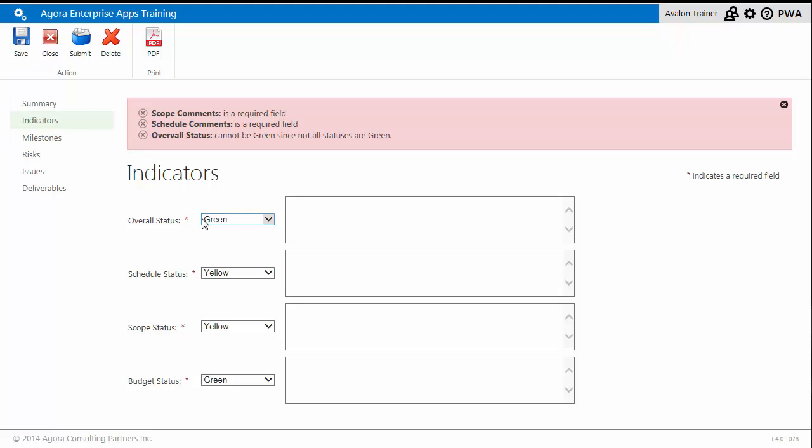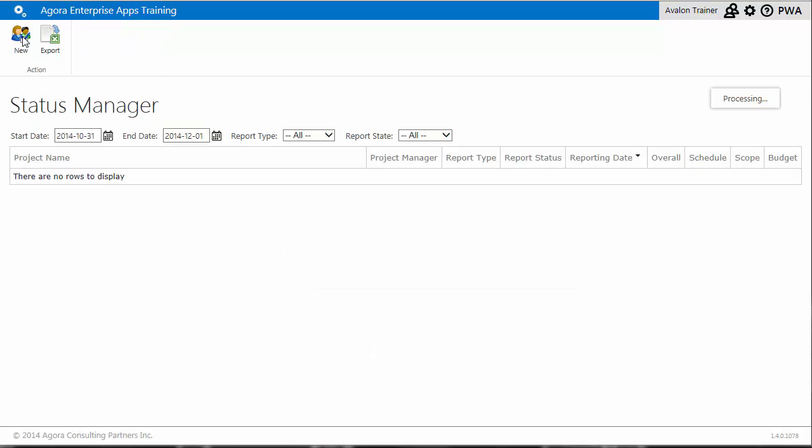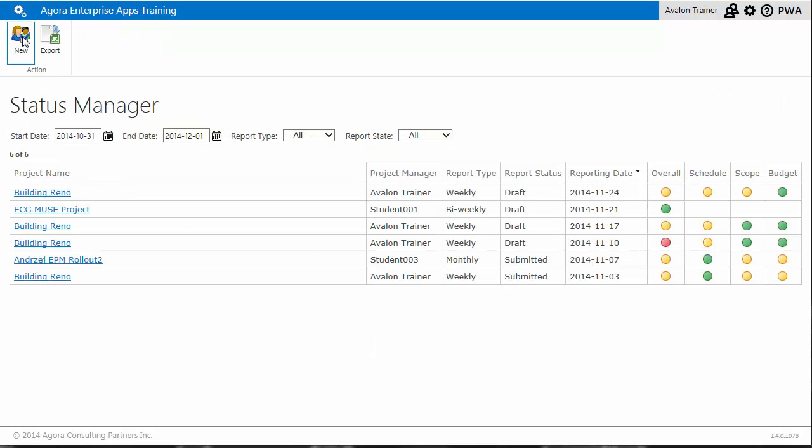And any status indicator set to yellow or red must be accompanied by a comment. Once the necessary comments have been entered, I can successfully save my new status report.